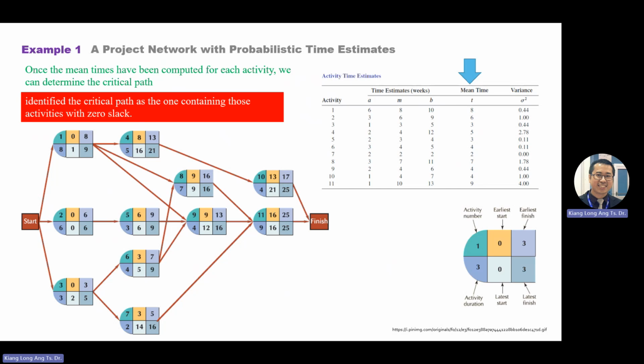Okay. This one yesterday I didn't mention, but this one came out once last semester. So most of the students, if they listen, then they know. Those that were absent from class once or came late once, they screw up the whole question. Okay. So again, the LF, latest finish, this number, you need to refer to the maximum time you have. Let's say you have 2 arrows, pick the maximum time. Not just copy that.